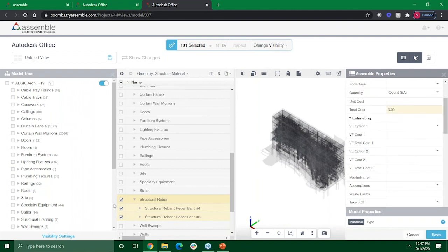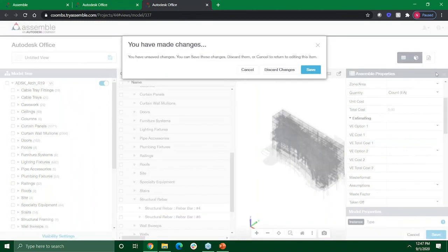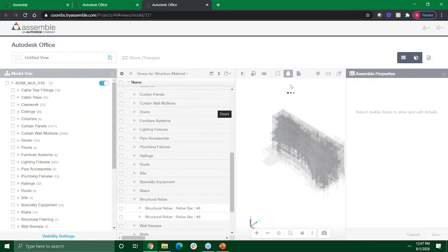Maybe you need to include something that's not assigned with one of those packages. Maybe they didn't assign the material to half of your steel elements and you're going to miss quantities if you don't pick it up. There's however many reasons you might need to understand and update those things. But that's the idea of conditioning right there, is something missing the value that you need, and being able to take control over what you add and put back into that system.